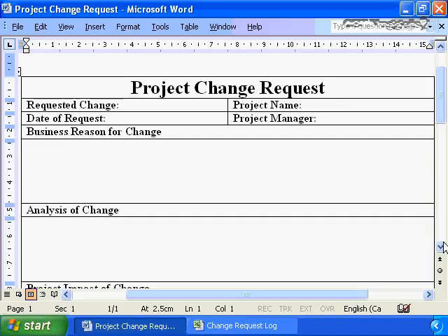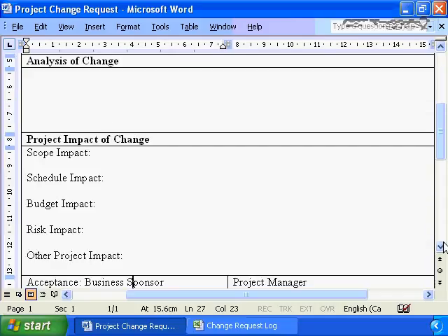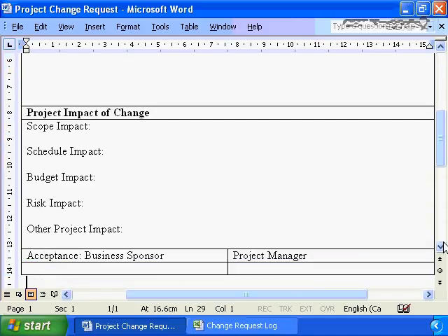If it's a change to that, don't take verbal confirmation. Verbal confirmation can be misinterpreted. Verbal confirmation can be forgotten. Verbal confirmation can come from the wrong person. They're not in an authority position to make the request. If it's a change to an approved, signed off document, it must be documented through the change management process, and it must be formally approved and accepted. And then it becomes part of your project baseline.